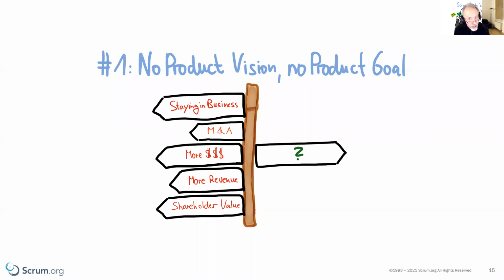And how can you spot this in the product backlog? Well, typically you have sprints where it will be very hard to come up with a sprint goal. So past sprints that do not have a sprint goal, for example, look like a list of tasks without cohesion or alignment. Just a bunch of work items that the team was working on. The occasional cleanup sprint where you do all the small stuff is totally fine. This is life, right? But if this happens 4 out of 5 times, something is wrong.